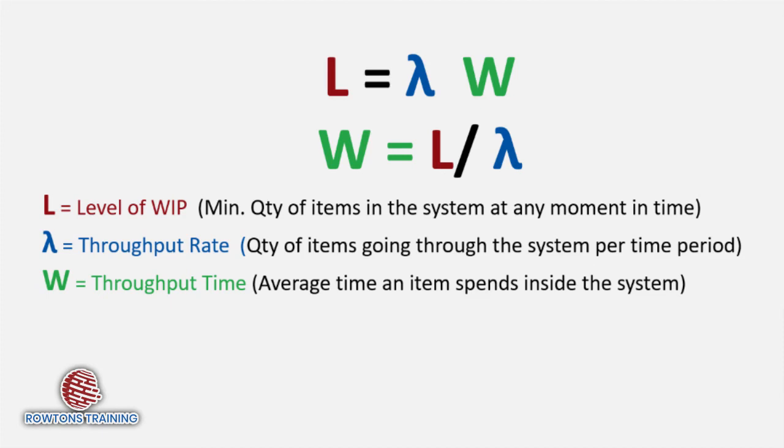So, Little's Law, an incredibly versatile formula that lets us work out the level of work in progress inventory given the throughput rate and the lead time.